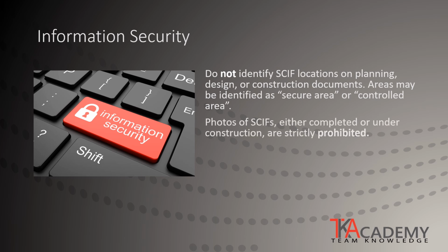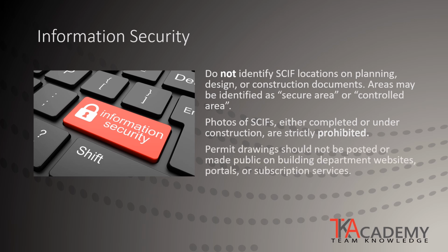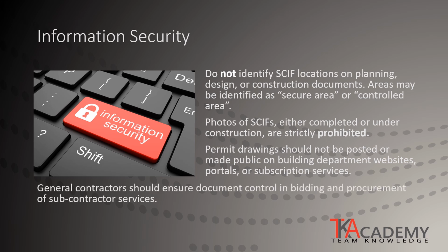Photos of SCIFs, either completed or under construction, are strictly prohibited. Should the project require a building permit, the permit drawings should not be posted or made public through the building department's website, portal, or subscription services. General contractors should exercise document control in their bidding and procurement of subcontractor services.